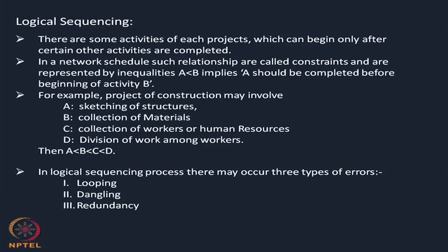So, unless I complete the activity sketching of structure, I do not know how much material is required. Again, unless material is collected, I cannot find out the workers or human resource who will work, and then which people will work, which kind of thing, I cannot divide. So, that is the reason the inequality can be here A less than B less than C less than D.